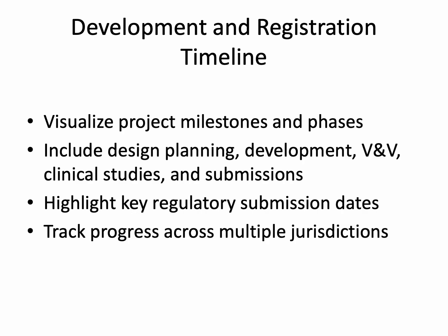A Gantt chart is a visual project management tool that illustrates the timeline, milestones, and dependencies for medical device development. It includes phases such as design planning, design development, verification and validation, clinical studies, regulatory submissions, and approvals. Key regulatory milestones, such as FDA PMA submission, Health Canada licensing, and EU MDR CE marking, are highlighted to ensure all teams are aware of deadlines and interdependencies.